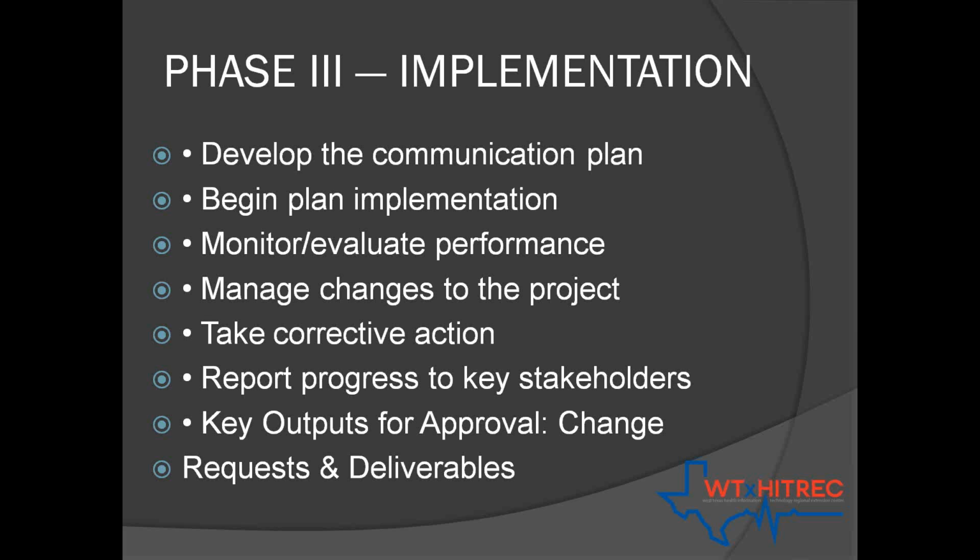You don't want to start something, 6 months later deliver something without any feedback from your stakeholders. So it's important that you have progress reports for anybody involved. What are the key outputs? Is it the same? Has there been a change in what you're delivering? If there is, you always want to make sure that those are approved. There might be an increase in cost based on the changes. You always want to communicate that and make sure that people understand that.